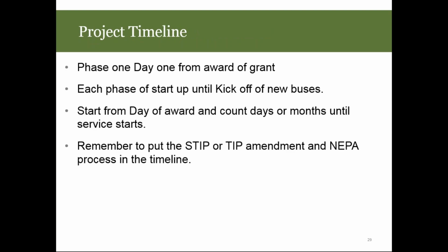Timeline. When you receive the funds, what happens on day one? And then when are you done with the project, when you are in service? So let's remember to give yourself time, work backwards, and create some space around your timeline. You're not trying to get it done as fast as you think you can do it.